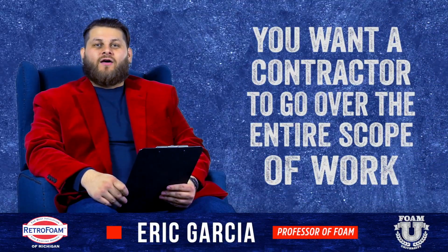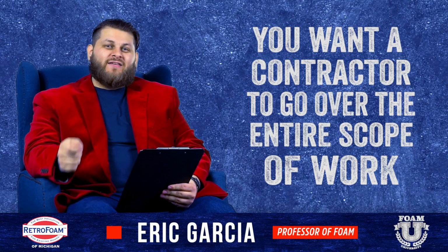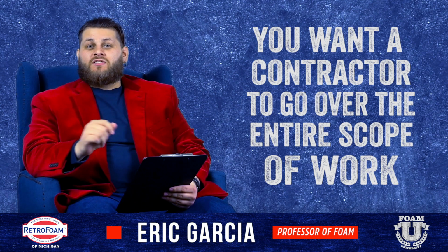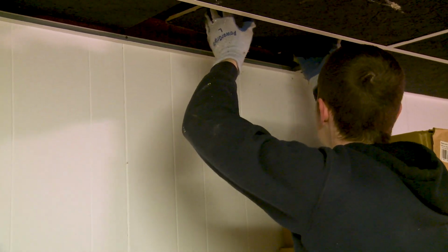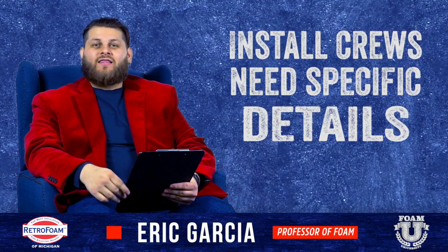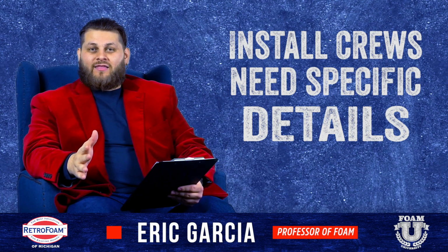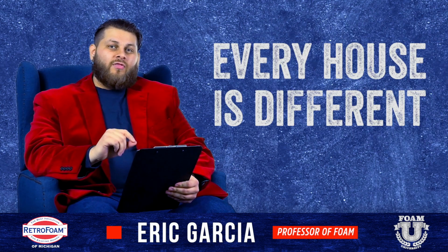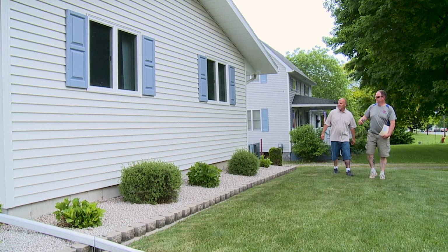The next thing we're going to talk about is you want that person coming out to go over the entire scope of work. You want them to get specific details on what is being done for the project. Now keep in mind, this is crucial for the install crew especially. If there's a special note that, hey, in this closet area, the hatch is a little weird and you can only open it a certain way, that's a specific detail that will help the crew a lot, and it could avoid damaging anything in the house. Keep in mind, again, every house is very, very different. So all those specific details really come into play during the install process. If you have that person out, do that visual inspection and have them take a lot of good notes.